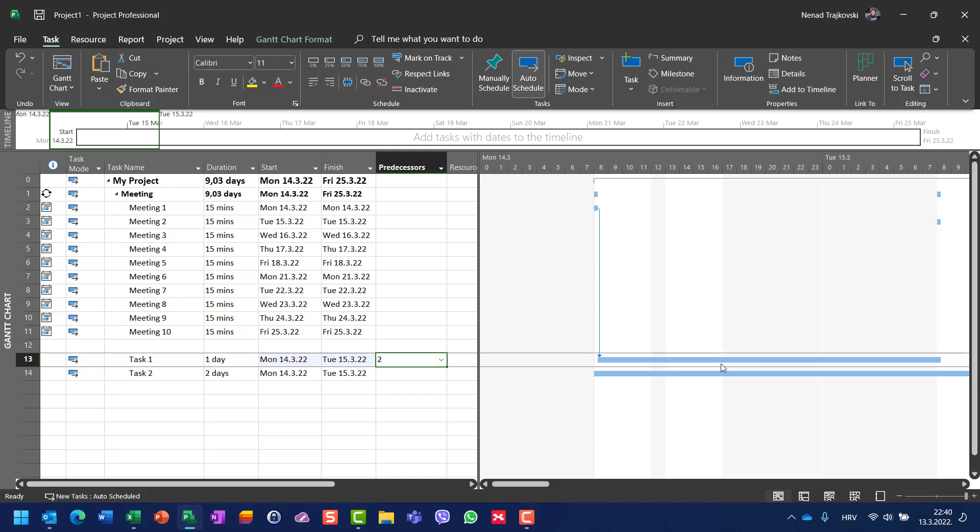So this task will start at 8:15, it will finish at 5 o'clock because my working time is from 8 to 4 or 5. Then it will start again next day from—and that is Tuesday—from 8 to 8:15.